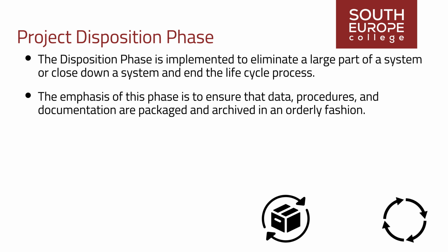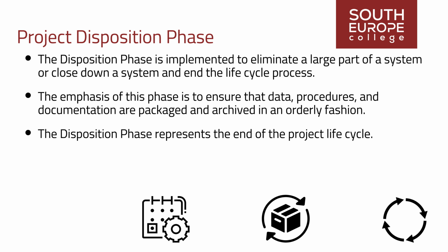The emphasis of this phase is to ensure that data, procedures, and documentation are packaged and archived in an orderly fashion, making it possible to reinstall and bring the system back to operational status if necessary, and to retain all data records in accordance with policies regarding retention of electronic records. The disposition phase represents the end of the project lifecycle.